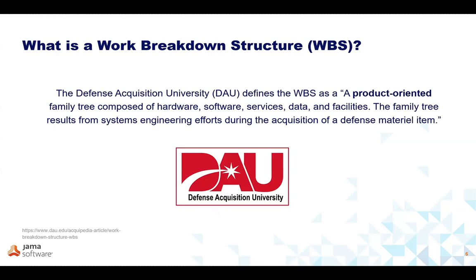It's what you're doing to produce the product or the system that you're building. The Defense Acquisition University defines a WBS as a product-oriented family tree of hardware, software, services, data, and facilities. So the theme really is this product-oriented, tree-like composition of the work breakdown structure. And it's not only composed of the product pieces itself, but the services and the data and the facilities and the results of the systems engineering effort. So it's the effort plus the product itself.